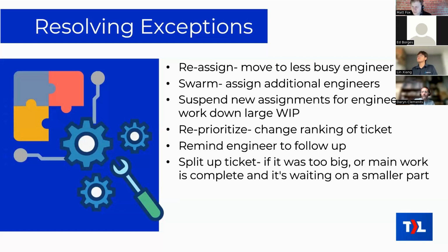Another technique is that you could split up a ticket into two smaller tickets. You might do that if a ticket turns out to be too big. It just kind of blows out of proportion. It's bigger than you expected. And so you want to split it up into smaller bits of work that are more manageable.